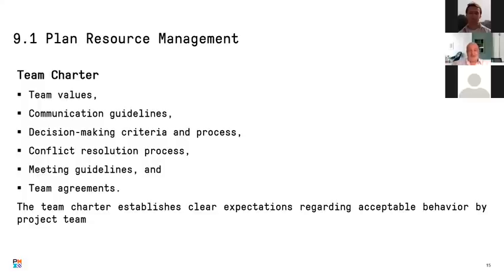The team charter also has, for your team, what are the values that you are trying to have, what are the communication guidelines, how they are going to make decisions, and how conflict resolution works. Conflict resolution we are going to talk about in the organizational theories at the end of today. And for decision making, we understand the three different decision-making methods according to PMI: we have voting, we have autocratic, and we have the multi-criteria decision technique.